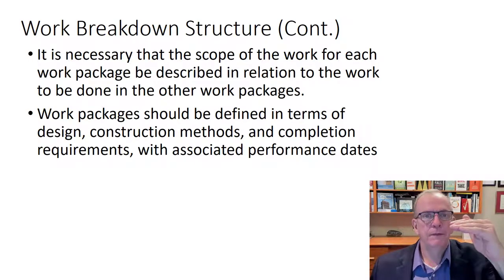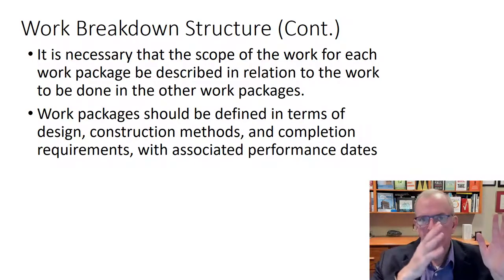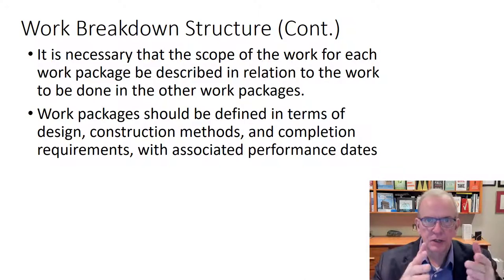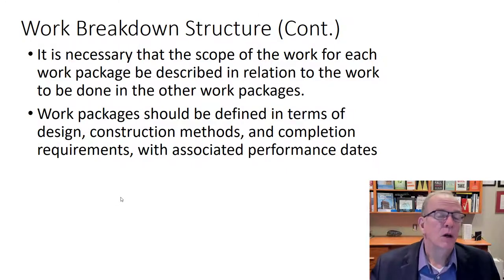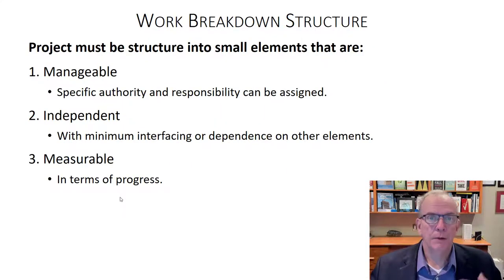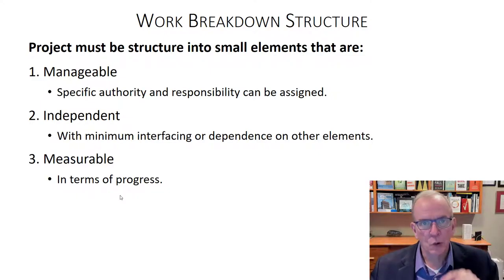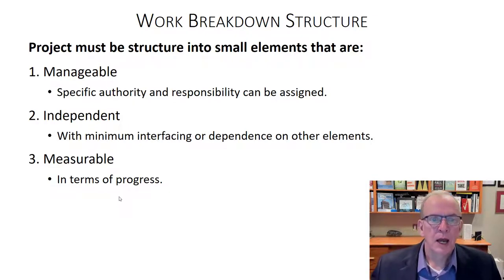But at the top of it, you would know when that substructure work is set to start and when it's set to finish. And the groupings of activities forming a critical path at the lowest level really add up to that upper level. And when we're dealing with costs, all the costs associated with the lower activities add up to the overall cost. And so we take it from the point of view that the work breakdown structure, we want to be able to manage it.